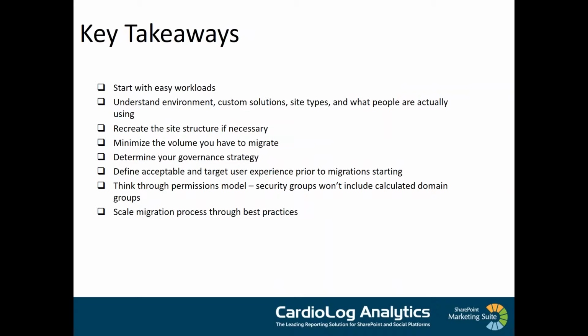Some key takeaways. You should start with the easy workflows. You should be sure to understand the environment, the custom solutions, the different site types, and so on and so forth. You should recreate the site structure if it's necessary. Usually it's a good thing at least to do a review of it, to look at it and see if this is optimal or can we do it better. Of course, you should minimize how much data you migrate. Don't move old crap if the documents aren't used, if things haven't been used for quite a long time. You don't need to move it.